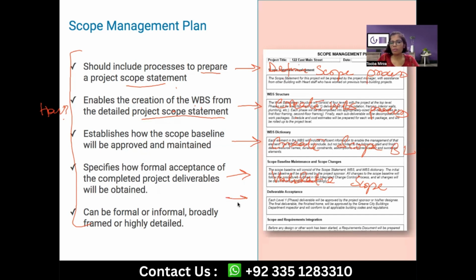Different stakeholders come into the picture, and they have their own narrative for management planning. You may have a process discussion for control scope as well, which is nothing but how scope creep is going to be avoided or how uncontrolled scope is going to be taken care of. You need to have a process for that because predictive is all about that. So all of this, the how, goes with the necessary strategy and management planning in this document, and later on in the respective processes. These are the different respective processes. These three are planning processes. These two are monitoring and control.